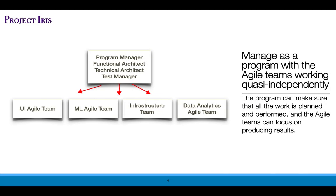A challenge is to coordinate this complex program, yet continue to take advantage of the focus and productivity provided by the Agile structure. The answer we've used in the past is to apply a program structure over the Agile teams. The program manager and architects can sit as a conduit that communicates between the teams and helps keep the structure in place, while each individual Agile project can focus on its work, interacting with the customer and driving out results.